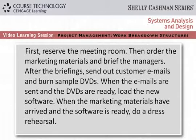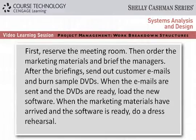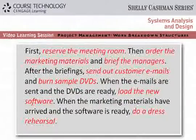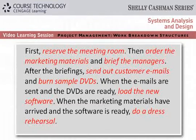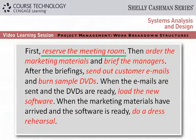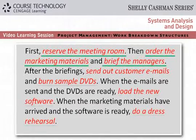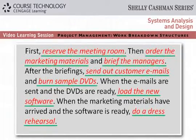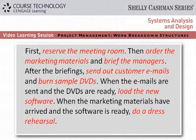You're a little concerned, because everything seems to run together. Here are some tips to help you identify and organize the tasks. First, highlight the words that describe the tasks themselves. For example: reserve the meeting room, order the marketing materials, brief the managers, and so on. Now the tasks stand out, and we're ready for the next step.